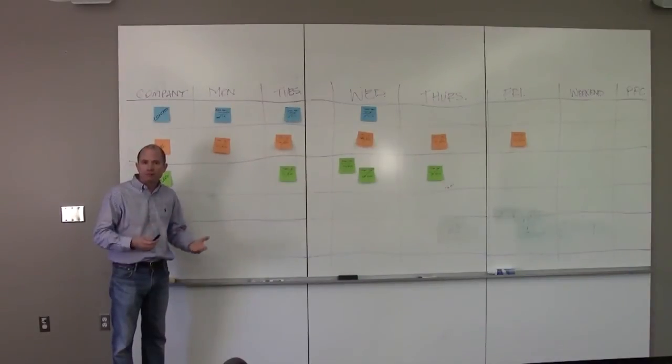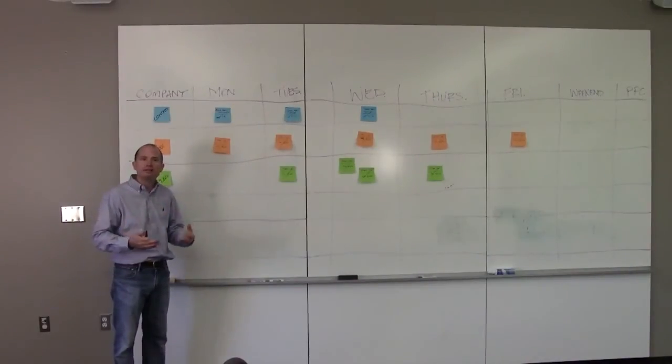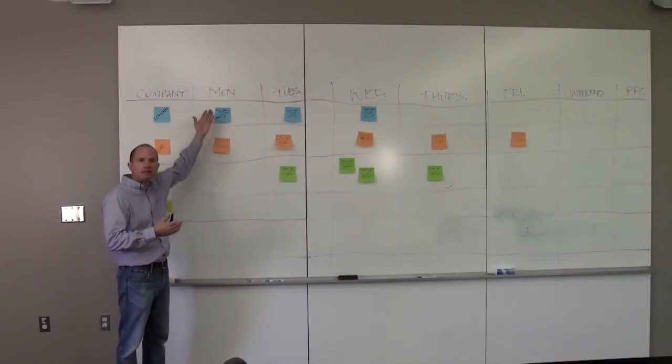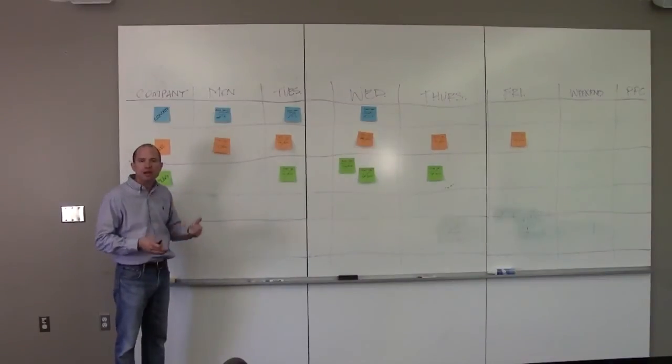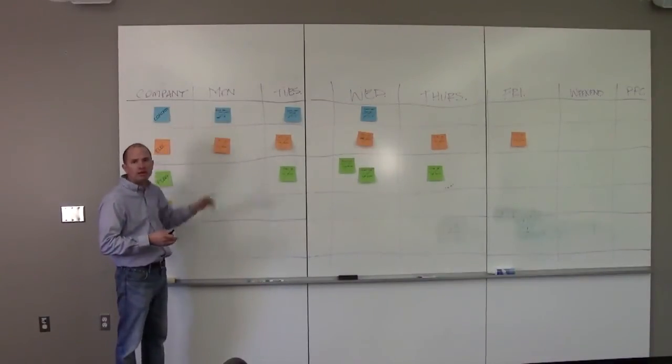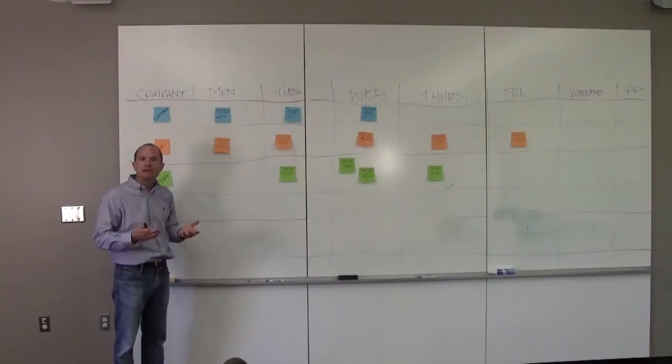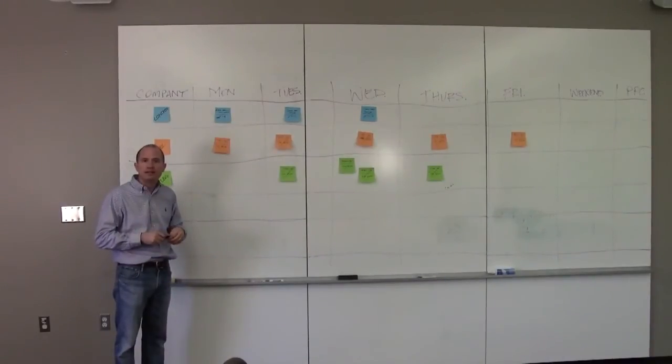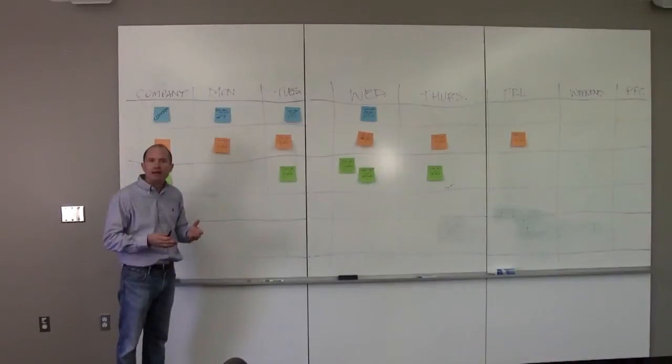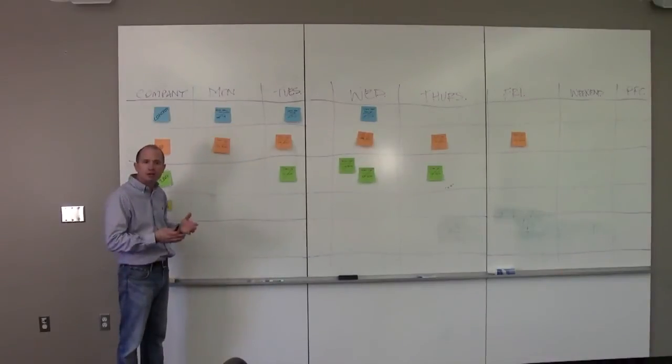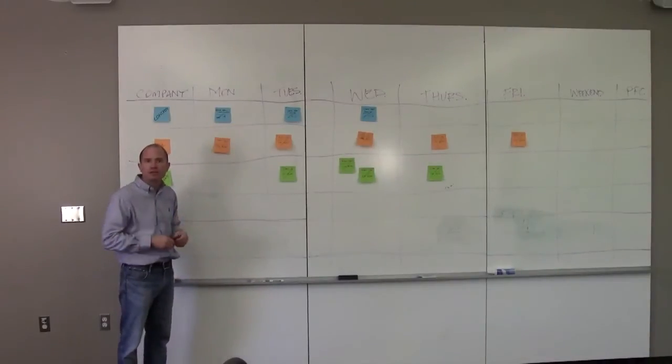Maybe it's an owner. Maybe it's an architect. Whoever it is that's next in line going to be using this, you want them to sign off on this person's work. That is a key principle in lean is the owner is not necessarily the customer, but the customer is the next person in line after your work.